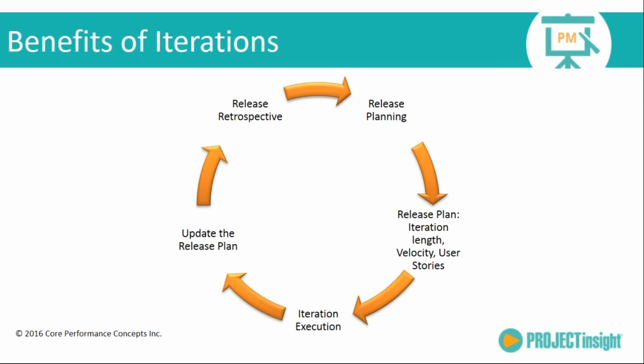I want to keep it very simple. It is additional iterations in order to get feedback sooner. And so, when we're talking about the Agile methodology, we talk about having a plan for a release. We talk about executing on that release plan through iterations, and we get to define the length of those iterations.